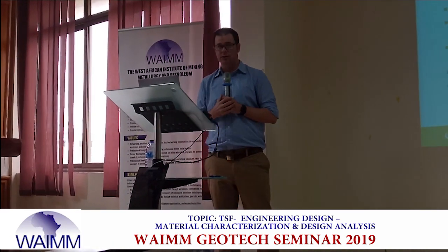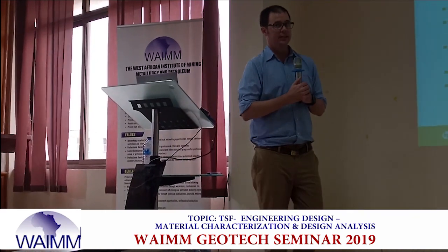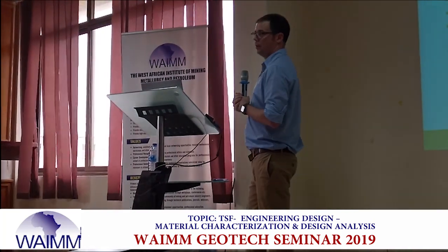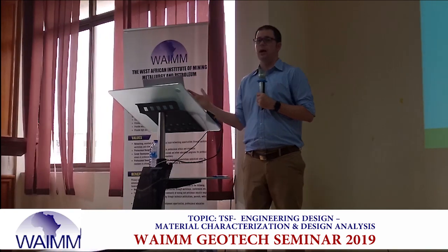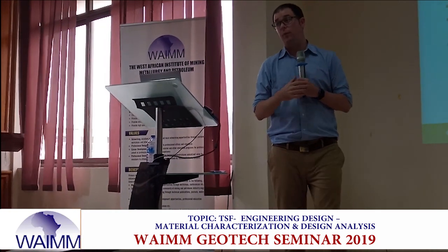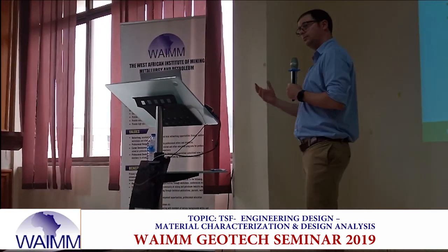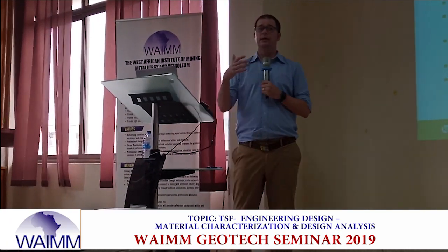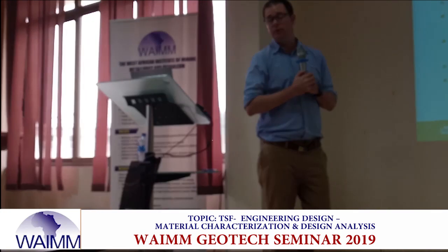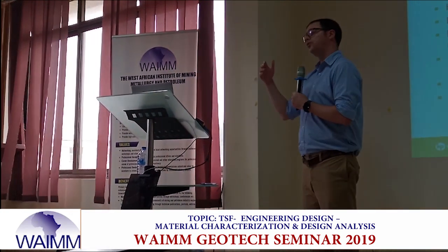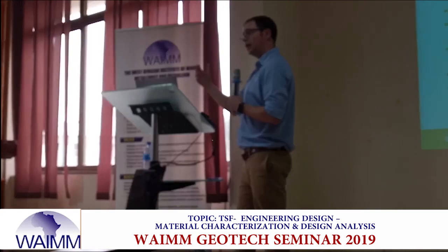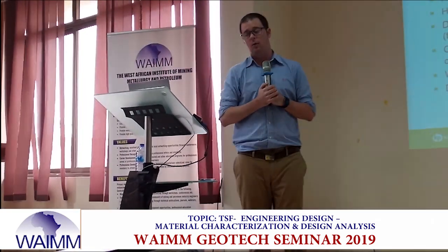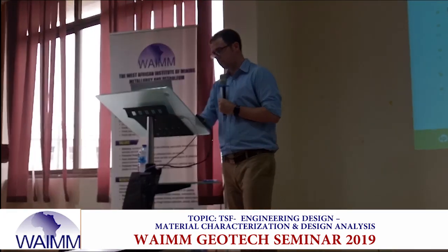And then does it fit in with our site-wide closure planning? For instance, if we have a certain amount of topsoil on site, are we planning on using all of our topsoil on the tailings facility, and then we have nothing left for our waste rock dumps, for our pits, for our roads? Or if, for instance, we have an old pit that we're going to be using, is there opportunities for maybe tailings backfill if it's designed and engineered properly? Is our final closure for that pit? What other options are out there?